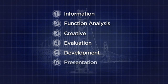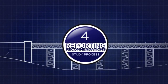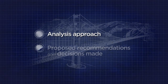The presentation phase presents the value engineering recommendations to the project stakeholders. And the resolution phase is when these recommendations are evaluated, approved, or denied. These decisions are documented, and all approved recommendations are then implemented. The value engineering study culminates with a formal written report documenting the following: the analysis approach following the value engineering job plan, the proposed recommendations and decisions made.